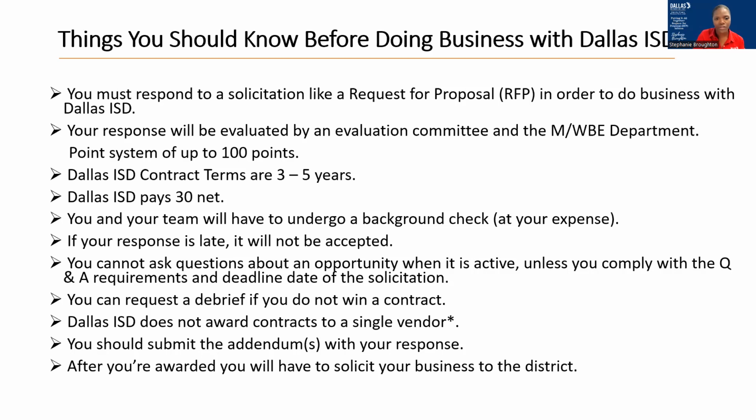Once you provide the service or the product, Dallas ISD has 30 days to pay you based off of your submission and receiving the product or service. So we don't prepay for products or services. It's after everything is delivered and received that you would get paid within 30 days from Dallas ISD. I hope that better explains that.